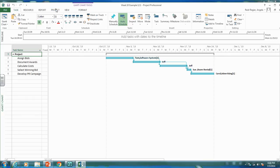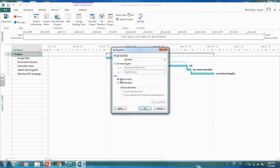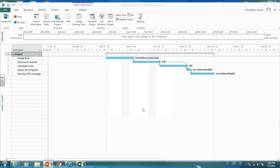To set the baseline, go to the Project tab and click on Set Baseline. Select Set Baseline for the entire project and click OK. Now it's baselined, and we can compare how we're executing our project to this plan.